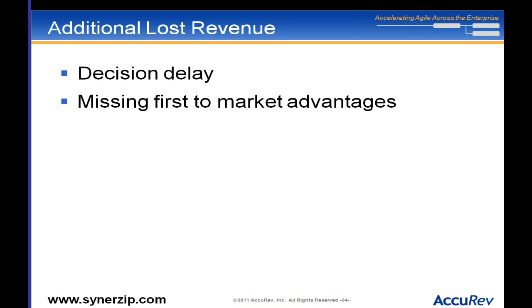A couple more things I don't have a lot of time to get into: decision delay is actually expensive. The cheapest money you can find is to move a project earlier. If you knew three years ago that something was very valuable to do and have only just started it, those three years represent lost revenue opportunity. So look at how to reduce the amount of time it takes to get something started once you've decided it's important.